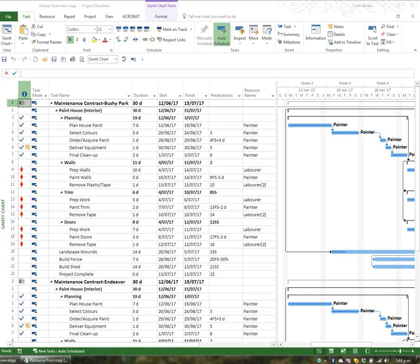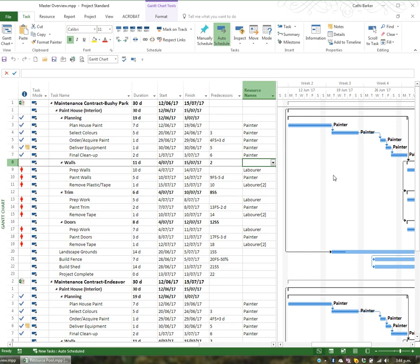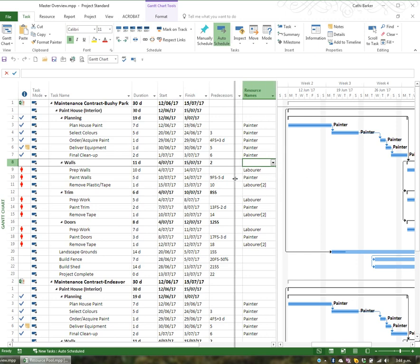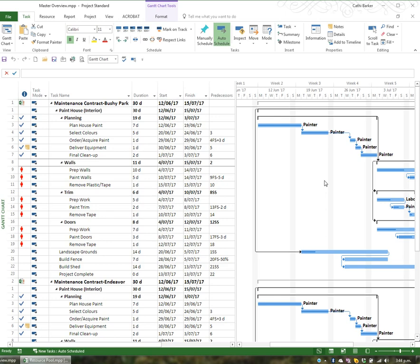It's important to be able to print the Gantt effectively so that people can see what's going on. Before you print the Gantt it's important to decide where the split between the table and the Gantt chart is placed. This placement of the split and the magnification and what you see on the screen does have impact on what's printed.